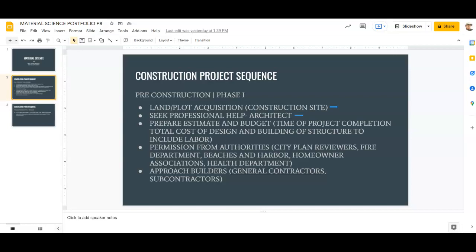Once the architect starts designing, they'll go back to the client and say, 'Here's what I came up with from all your ideas, wants, and needs — what do you think?' The client could love it, hate it, or everything in between. They might want to change a few things. If they're paying you, you'll have to make some changes, but you can work it into your contract — say, only a certain number of changes for this price, and any more changes will incur an additional fee.